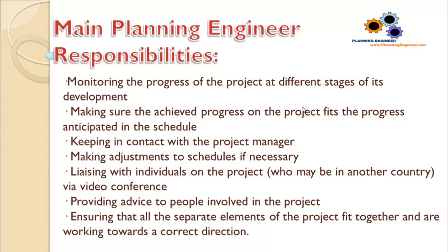Usually, the first schedule you make will not work 100%. So at any stage of the project, we make a revised copy of the program or the project schedule. So making adjustments to the schedule if necessary is one of the planning engineer's responsibilities. And of course, communicate with all the project team, who may be in another country, even via video conference.